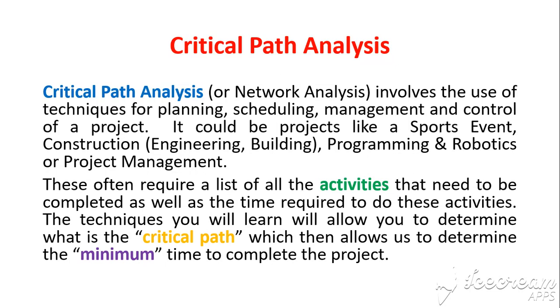These often require a list of all the activities that need to be completed, as well as the time required to do these activities. The techniques you will learn will allow you to determine what's called the critical path, which then allows us to determine the minimum time to complete the project.